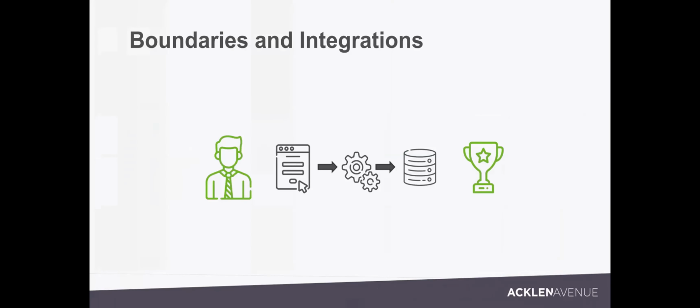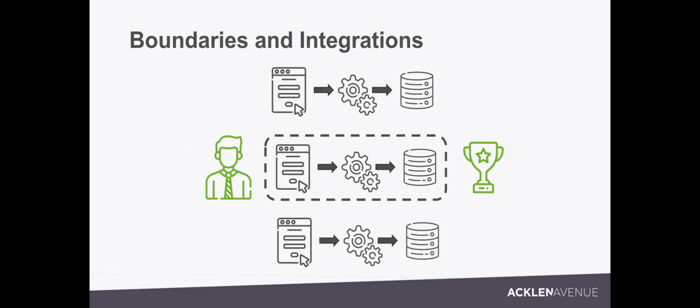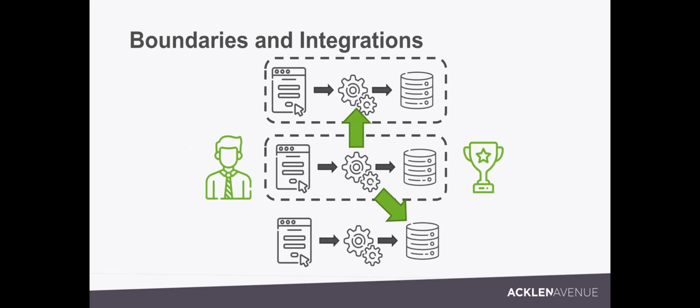So that's where the boundaries and integrations come through. So there's what our system does, and then there's systems that I have to touch outside of that system. And then also knowing, all right, is that system internal, like we can make changes to it if we need to, if that API doesn't supply what we need, or is it an external system that I have no control over whatsoever. That also adds a degree of complexity. Sometimes there's APIs that I'm consuming that are outside of my control and I can't change them and they just are what they are. Sometimes it's an API from another team, but I could ask that team to make changes if I needed to.